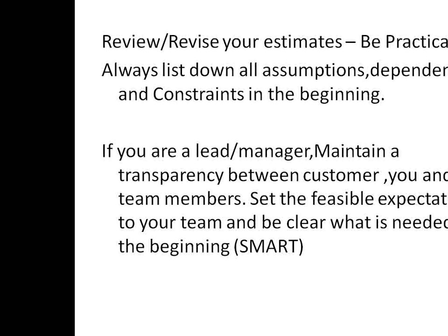Normally we have a habit that we do the estimation and then we forget it, like do and forget. It's a very wrong habit. Please try to revise your estimates. Discuss your estimation. Even if you are the senior manager, discuss with your team members. They may have some idea which you don't have. So always review and revise your estimates from time to time. More or less it should be stable, but it might need some correction, say 2%. Even 2% is important.